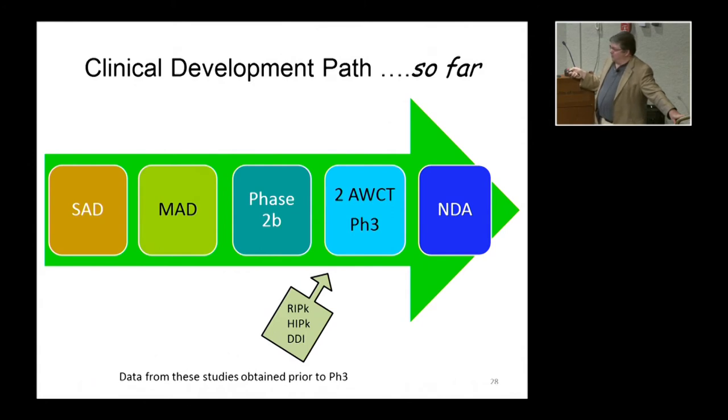There's actually one more thing here, so it's not really your critical path, but any slip up of the timeline of any of these studies and the whole project timeline shifts forward. Whereas if your drug interaction timeline slips, it's not gonna have as big an effect. So when you're the person responsible for the critical path, there's a lot of pressure on you.